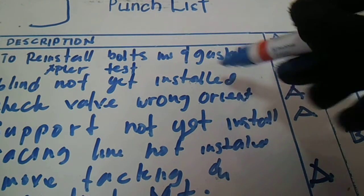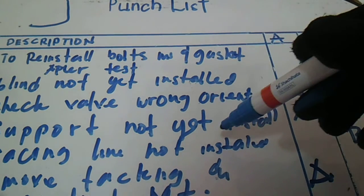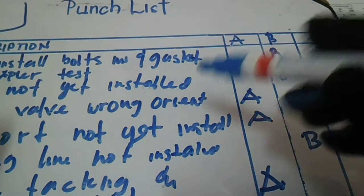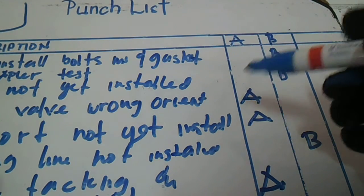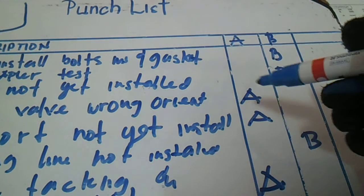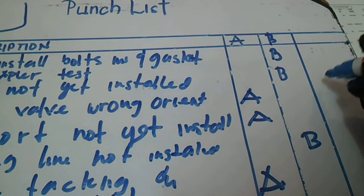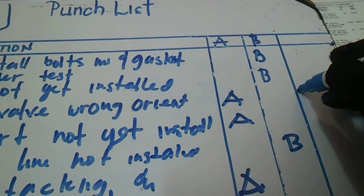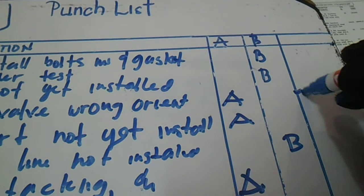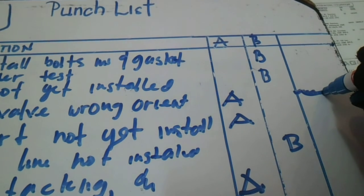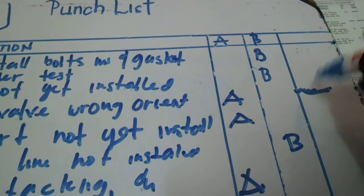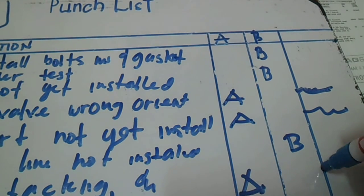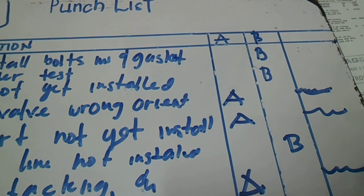Once construction has finished all category B items, then both parties countersign — the inspector countersigns here and countersigns the category section as well.